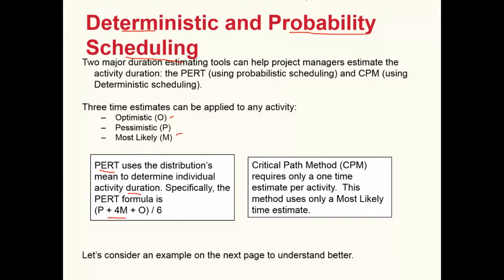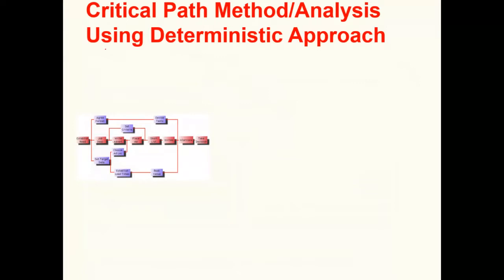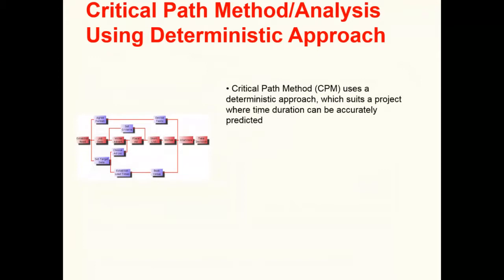In construction it is very difficult to have precise cast-in-stone times. Contractors will give a time bracket: in ideal conditions with perfect weather, the optimistic time might be seven weeks, but if materials are late or weather is inclement, the pessimistic time could be 12 weeks. In the examples seen so far, we have used the deterministic approach — CPM uses a deterministic approach which suits projects where time and duration can be accurately predicted, though CPM can also use probabilistic times.